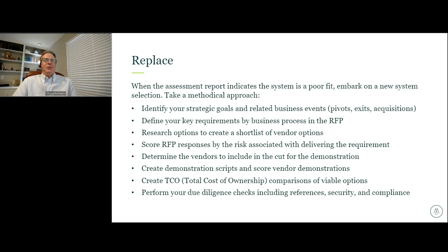And what we're going to do there is make certain we've done that internal diligence first before we're talking to vendors and framing out that conversation in terms of what we need. And at that point, we look at options to come up with a list of potential vendors that can solve the problem or be the system of choice. And we publish an RFP that incorporates the business requirements that we found during the assessment and have the vendors respond to every single one of those requirements quantitatively.